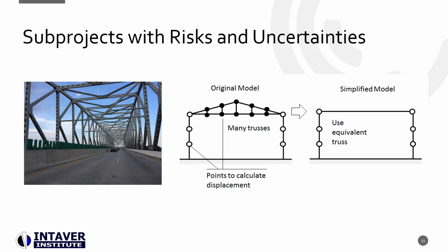Another way to simplify risk analysis of complex projects is using sub-projects with risk uncertainties. The mathematical foundation for such an analysis was developed as an extension of finite element structural analysis and called static condensation. Most structures such as bridges, buildings, as well as other engineering objects such as launch vehicles consist of similar elements. Structural analysis of each element is performed individually. Then such elements are inserted into the main structure's finite element model. As a result, much smaller models are required to be analyzed.